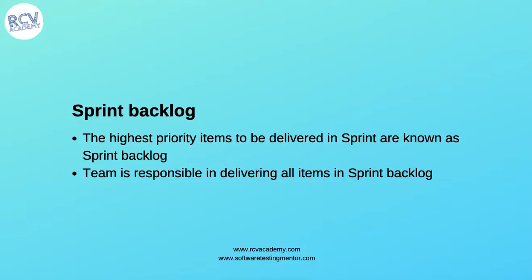What is the sprint backlog? The sprint backlog is the set of items you pick in the sprint to build within that iteration. The highest priority items to be delivered in the sprint are known as the sprint backlog. Depending on delivery priority for the whole project, the highest priority items are picked first in the sprint. The whole team is responsible for delivering all items in the sprint backlog.